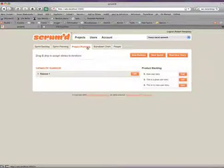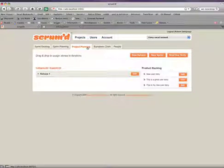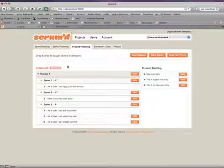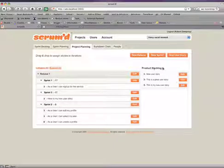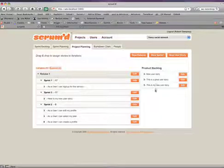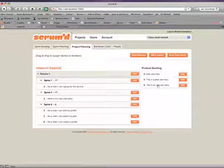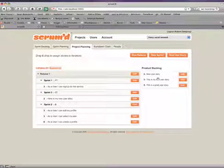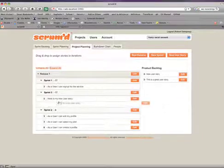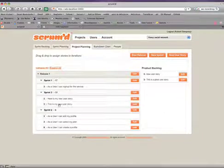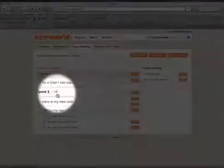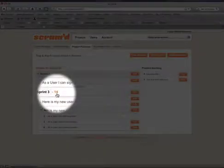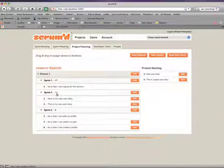...the next thing we move to is the Project Planning tab. On the Project Planning tab, a lot of things happen. We can create new releases, new sprints, and new user stories. When we create a new user story, it's automatically put into the product backlog. Once in there, these stories can be edited or they can be sorted according to priority of the product owner. We can also assign the stories to a sprint by dragging and dropping. When we do that, we get immediate feedback and we see how many more story points we can add to that sprint.